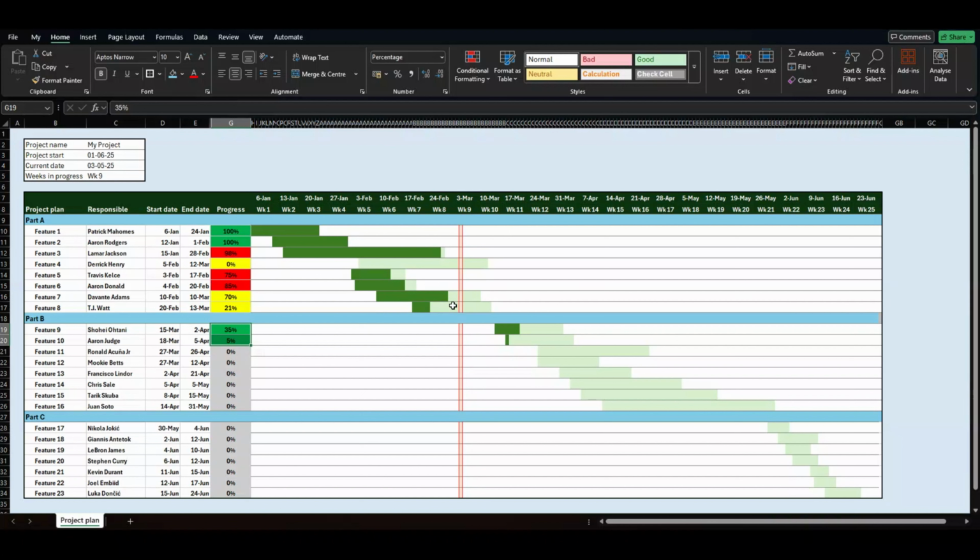So in those 2 cases, for example, I should have come further, but I shouldn't be done yet. But the red ones, they should have been done by now, and the due date is passed and I'm still not done. And then I would put gray colors for those that shouldn't even have started yet and we have no progress yet.